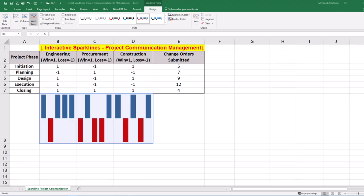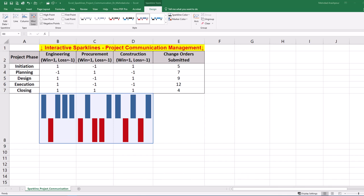Step 2 is generating line or column sparklines. Win-loss sparklines are ideal for visualizing binary patterns of communication effectiveness. However, column or line mini charts are more suitable for representing quantitative data, such as the number of change orders which can vary in magnitude. This helps track the volume of change orders across phases and allows you to see trends or spikes in numbers.